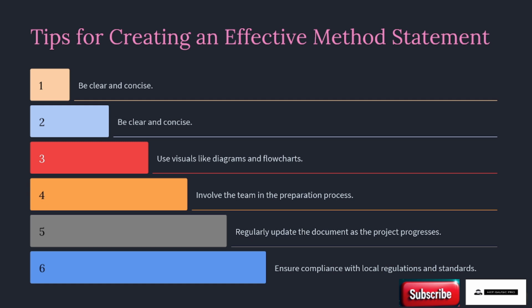Okay, we changed this process because of this reason, and we are implementing the advanced procedure. You can show them why you are resubmitting the method statement, because of these two or three reasons: maybe material replaced, maybe techniques, maybe tools are replaced, maybe new techniques came, a new way of procedure you are implementing at site. That also needs to be resubmitted as a method statement. So the consultant will also be aware of what you are doing at site, whether it is correct or incorrect. For sure, they will reply in a report.